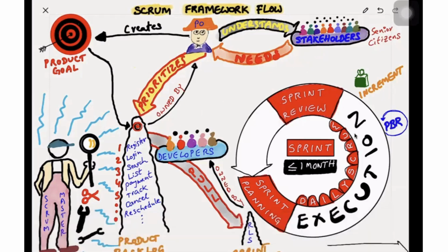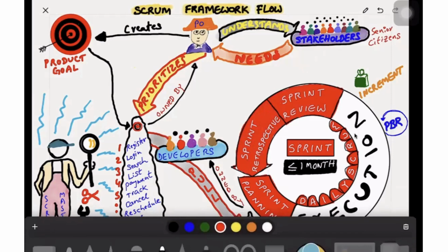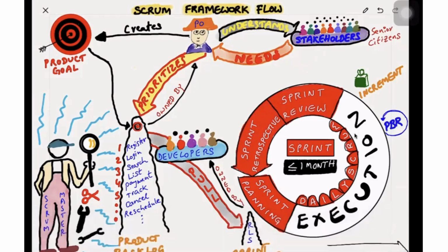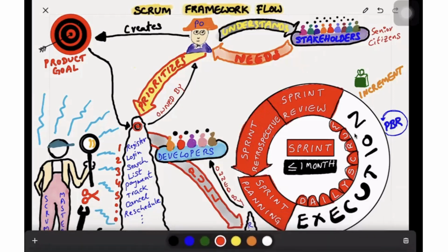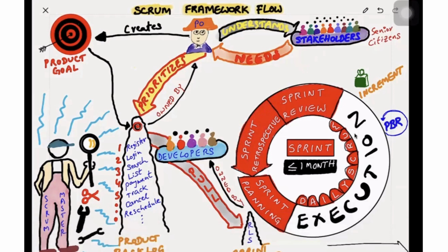After the sprint review, they go to the last event of the sprint on the last working day. After the review, the retrospective will happen. The purpose of sprint retrospective is to inspect people, processes, tools, techniques, structures, templates, all these things, how they have helped in the current sprint, and is there any improvement that we can do as part of that learning. So that means the primary difference between sprint review and sprint retrospective is sprint review is to get the product inspection done. The retrospective purpose is to get people, processes, tools, techniques, inspection done. So after that retrospective, the sprint is concluded.